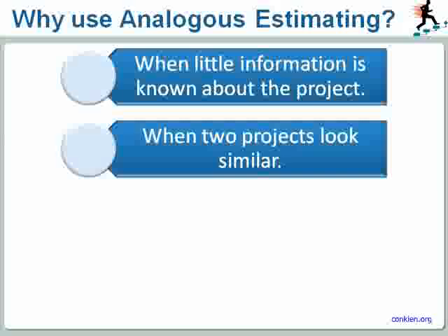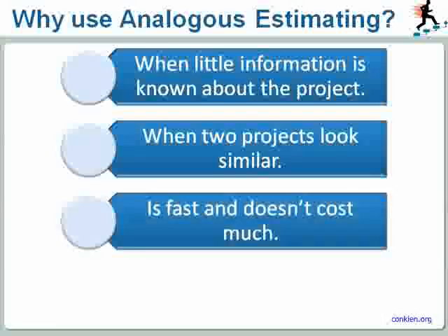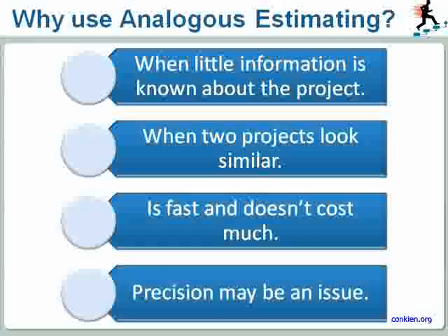On the positive side, analogous estimating is fast and it doesn't cost much. On the other side, it is good for ballpark figures, but it is not well suited for precise estimation of projects or timeline development. In our earlier example, my software developer had done a similar project in the past, and he had applied that experience to the new project and estimated 3 months.